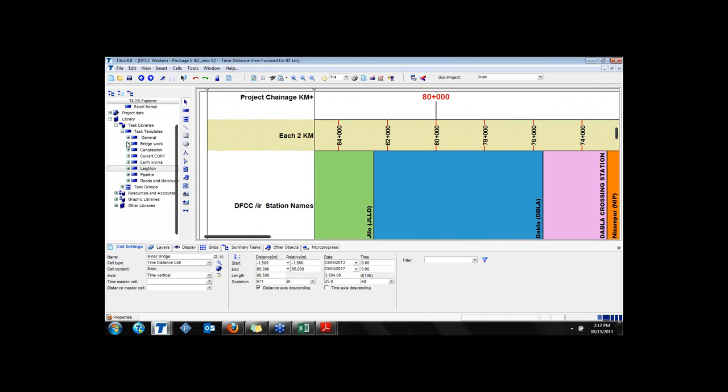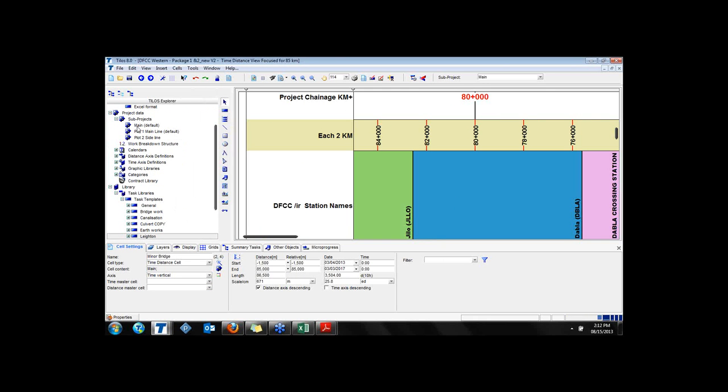So in TILOS, you can exchange your sub-projects. Here there are three projects: one is the main, and it is also divided into 2 sub-projects. There were 2 planners managing at the early stage of the project. One was preparing plot 1 and one was preparing plot 2, but in the main part they were merging the files and having the whole project. At the weekly meetings they discussed where they are in the planning, what the risks and constraints for the project are, and with the briefings they managed the preparation of the work in a visual way.